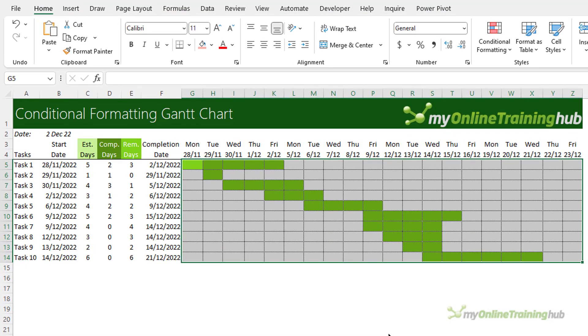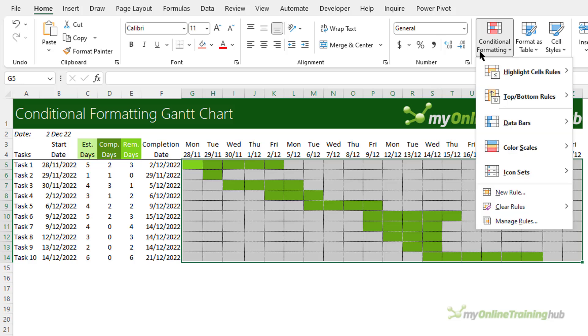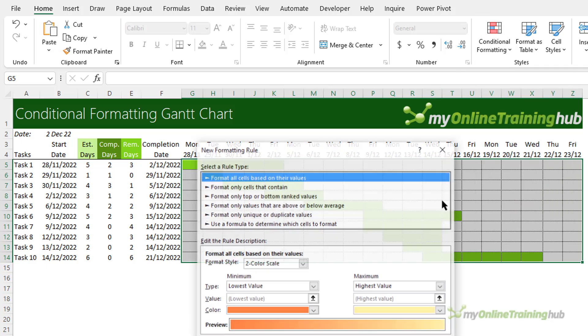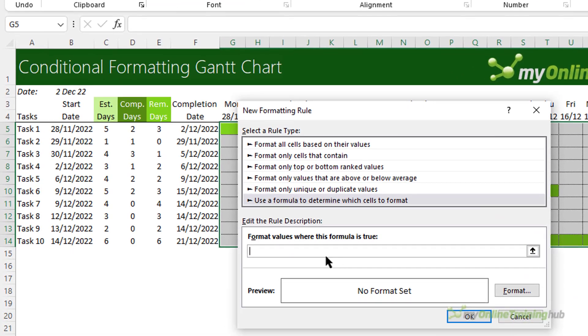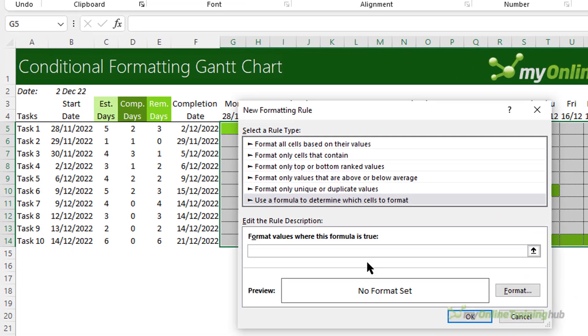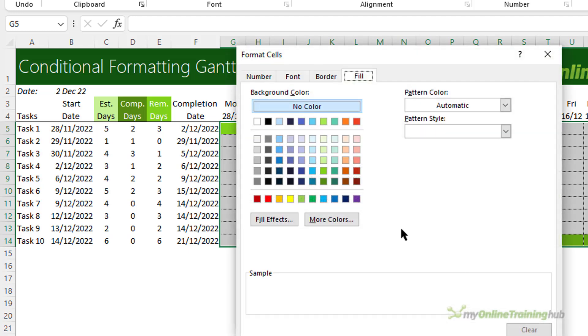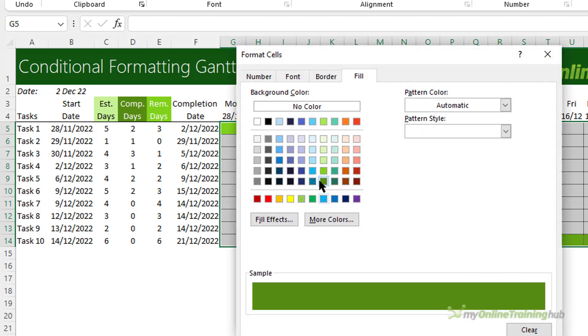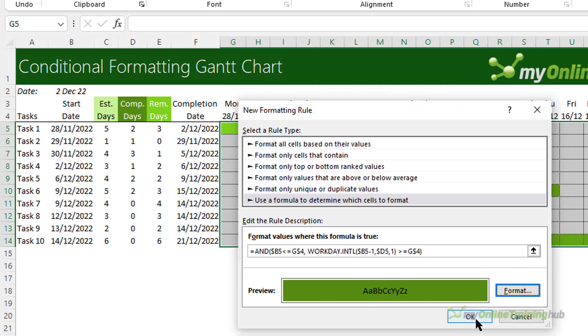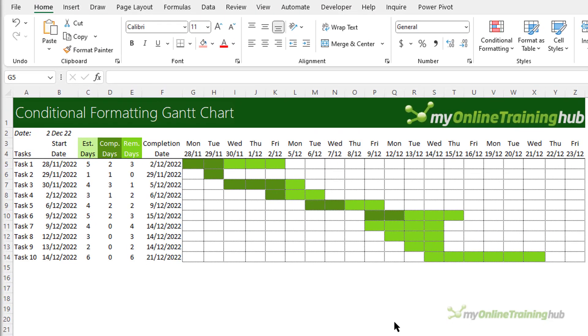So you can see it's highlighted more than just the remaining days. But as I keep adding conditional formats, those are going to sit on top of this first formatting rule. The next rule is the completed days. So again, Conditional Formatting, New Rule. And we want the formula. Now the formula is the same almost. So I'm just going to copy in the previous one. And instead of C5, which is our estimated days, I want my completed days. So I'm just going to change that to D5. And then let's set the format, which will be this dark green. OK and OK. So now I can see the completed days.